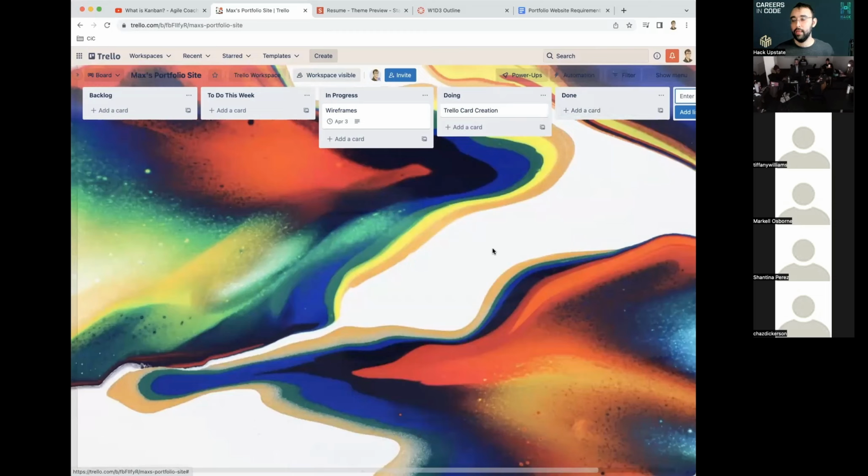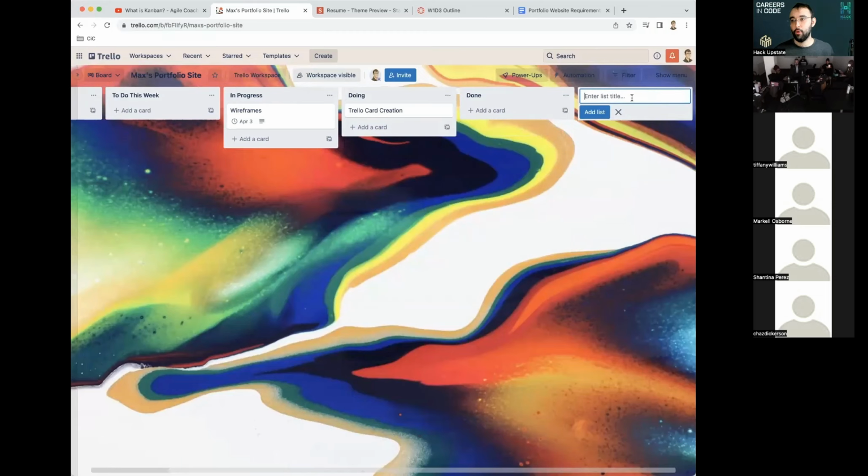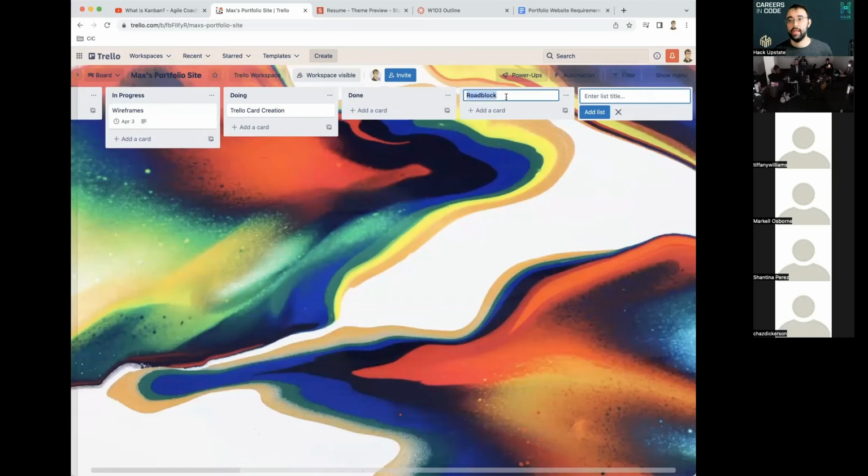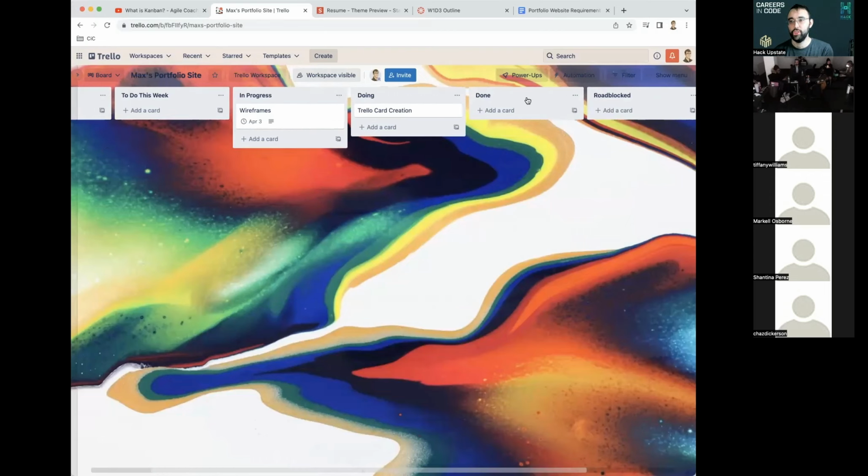Okay, so I've got my doing. And you know what? I did realize I forgot one list, I'm sorry, and that's my roadblock. Right? That's things that I'm stuck on that I need someone else's help with. And so I can add that in over there. Okay. To do, doing, done, roadblocked. I like switching these so my roadblocked is a little bit more visible. Because when things get to done, yeah, it's great to review them in my retrospective. But for my roadblocked, I really want to keep an eye on them and make sure that if something is roadblocked and I haven't heard back from someone in a while, I can go back into that list and check.